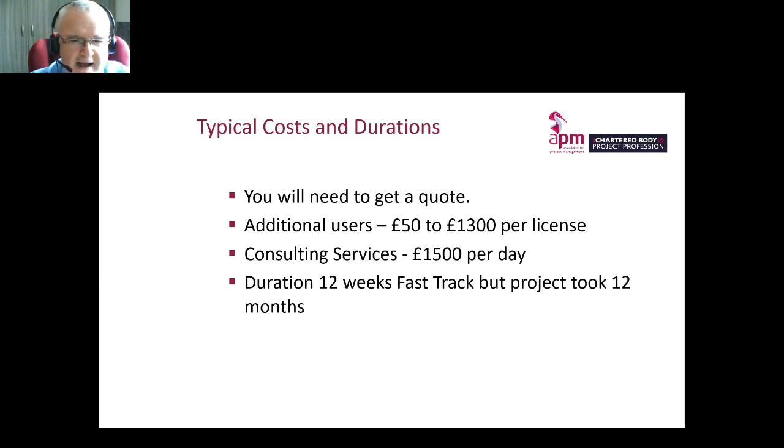a day. And the initial implementation, they call it a fast track, takes 12 weeks, but the entire project actually took 12 months. So I was obviously carrying the internal project costs for the 12 months. So that's just to give you some sort of idea.